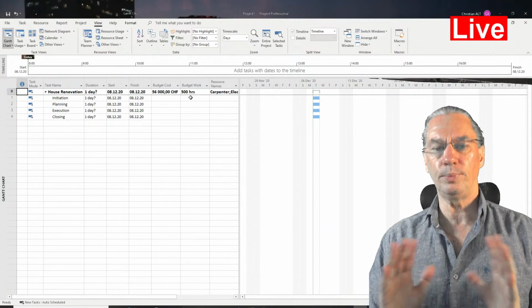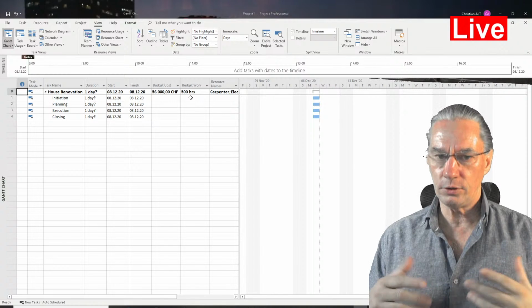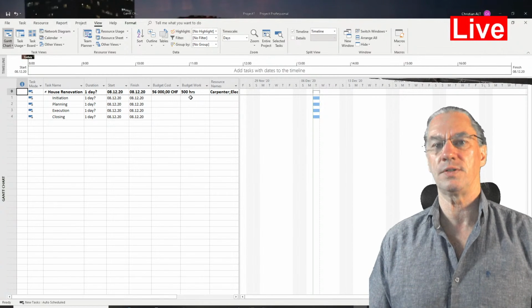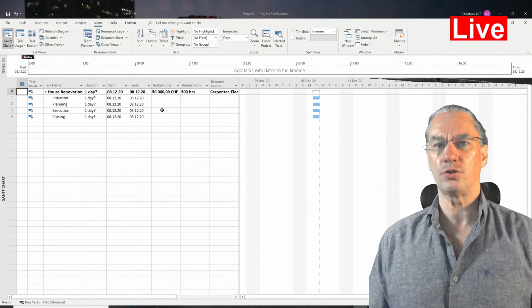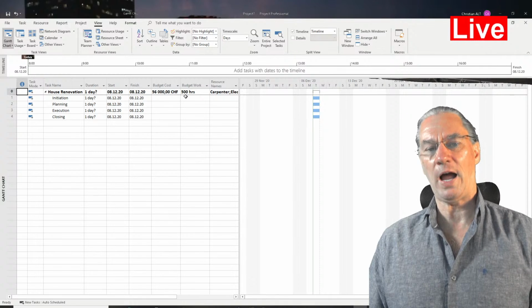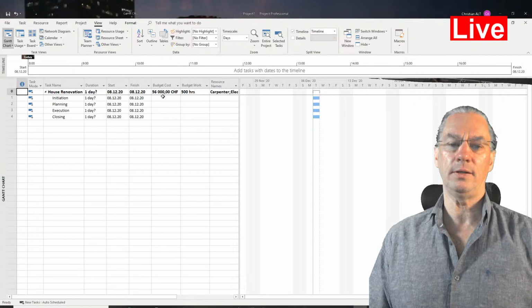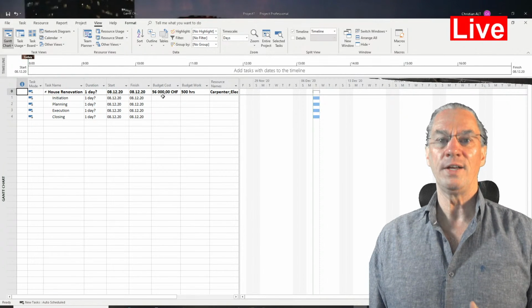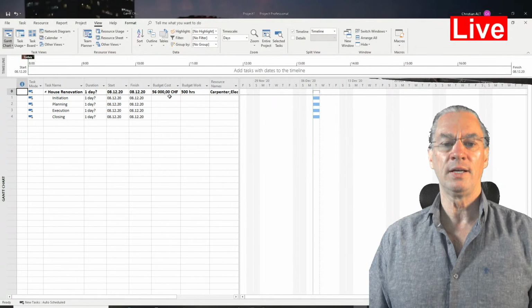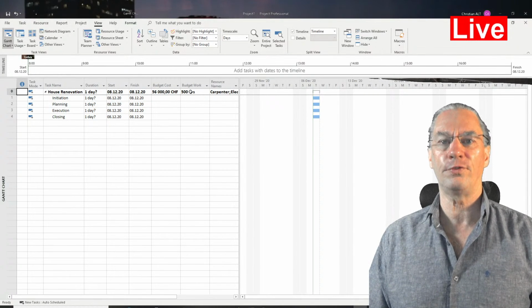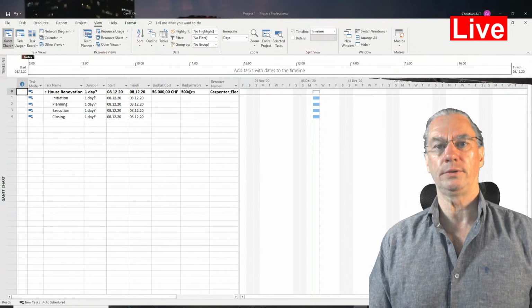So I have a complete video on this subject of internal resources that you can watch. It discusses this topic, how you can do it at the actual stage as a reserve, and for the hours also 10%. So we'll admit that I create a reserve of 6,000 euros or Swiss francs, and I will add a reserve of 50 work hours. So now, how do I do that?